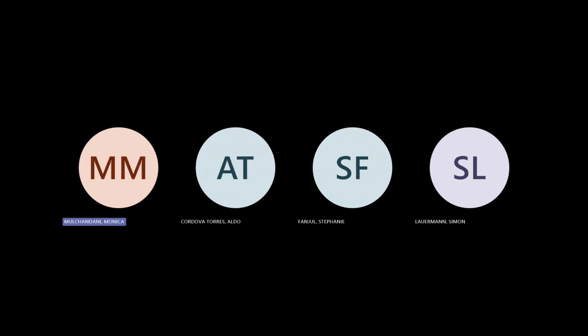Once they do scope, they do design, so they are in a hierarchy. So first it becomes scope inbox. The next department gets it in the inbox, and it's up to them when they start the work; they put in the date and it becomes active. It's not that the other department handed it over and the clock starts ticking for them. There could be a delay, or someone not ready to start. So it comes in their inbox, they know there's a project they have to scope out. When they start, which could be after 2 days, it gets a date saying they started, and then the status changes to A&E scope active.